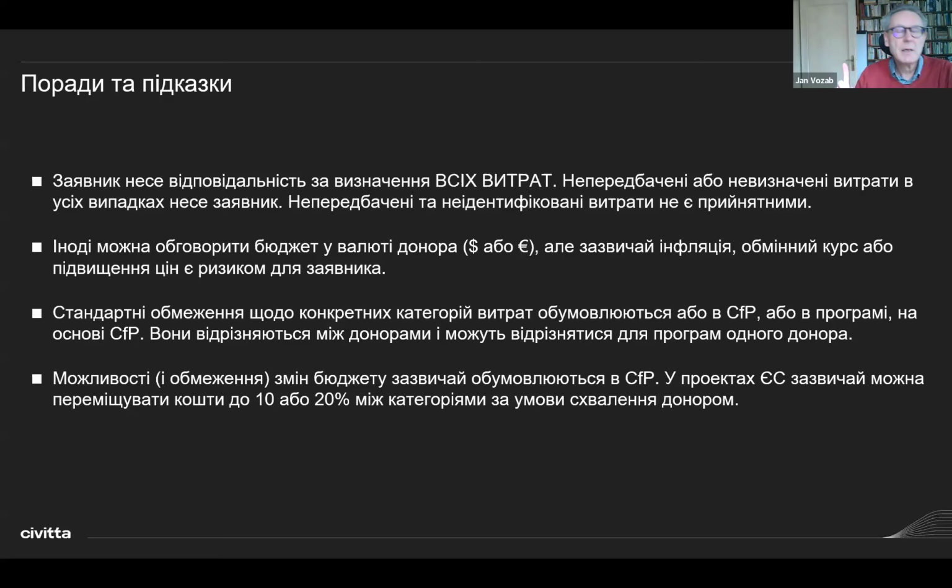So the eligibility check for you is that after you've got all the cost items identified, probably even before calculation of the real expenditures, just when you identify all the cost items, you check whether the cost items are eligible to be paid by the donors' rules.